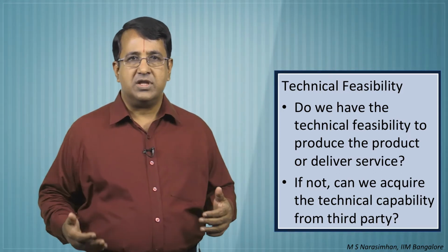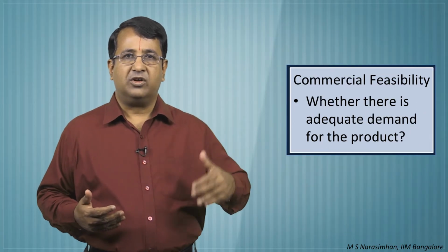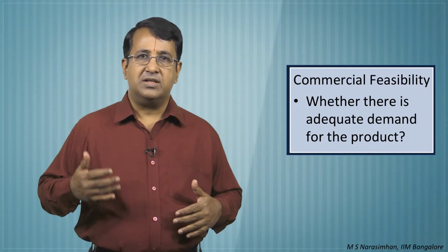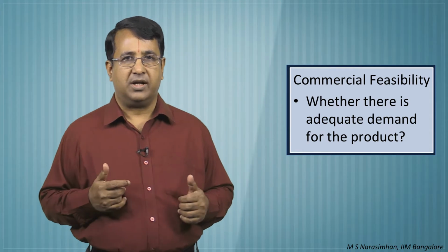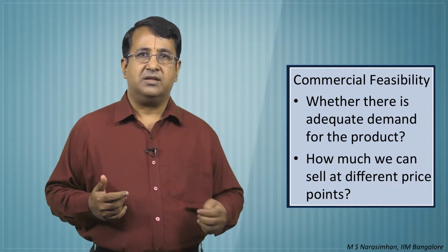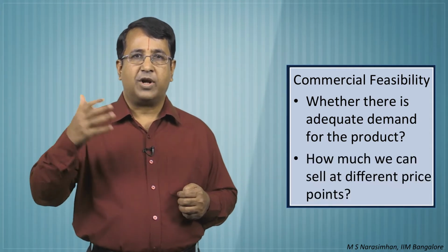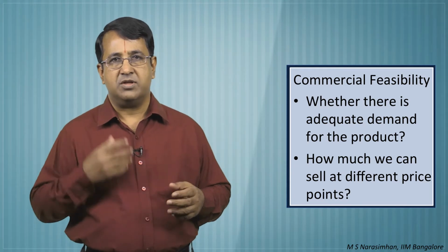Once the technical feasibility is established, the project sponsor should check whether there is adequate demand for the product. The process of assessing the demand at different price points is called commercial feasibility. If the project is replacing existing equipment, there is no need for detailed technical or commercial viability studies. It is adequate to collect basic technical features of the equipment and its compatibility with other equipment.